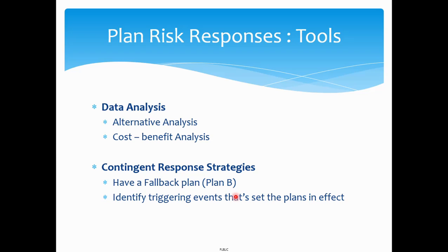In this, you're planning your risk responses, planning what to do for this risk. Obviously you will have an alternative analysis, either to buy or rent, or to outsource. Even when you outsource, there can be cascading secondary risks coming in. Even if you recruit, there can be residual risks involved. So you will be doing an alternative analysis and a cost benefit analysis, and based upon these you will decide the correct risk response for the risk that is in the risk register.